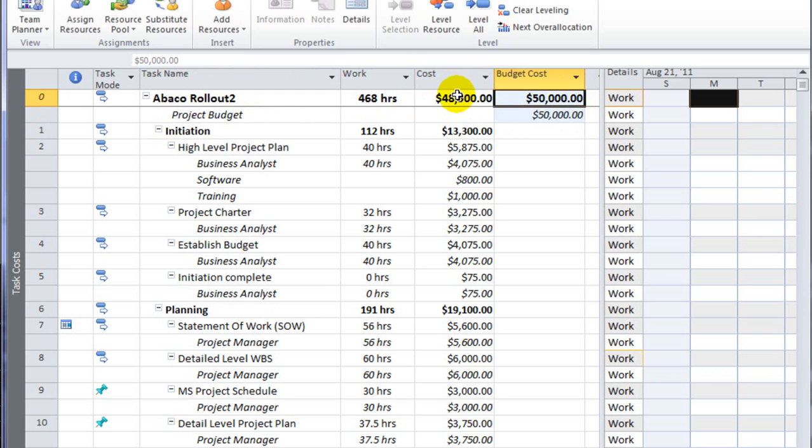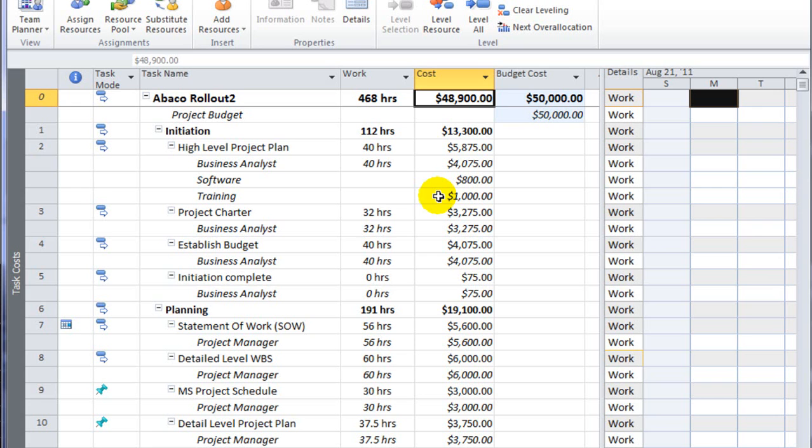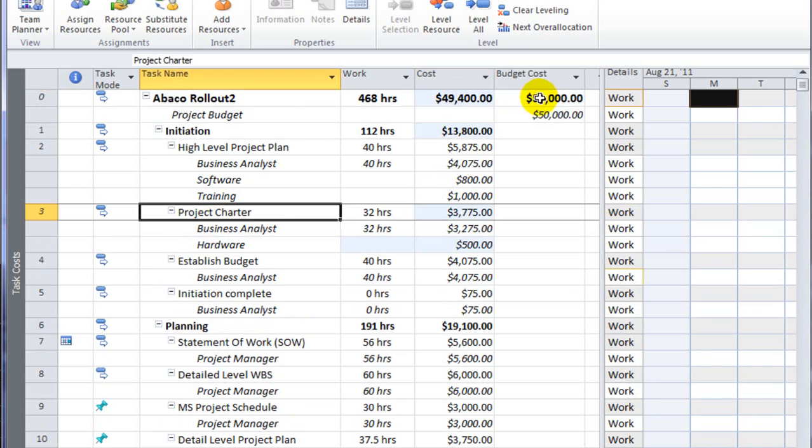My current schedule cost, which is the sum of all my work and detailed cost assignments, adds up to $48,900. So you see how the project budget resource allows me to have a target that I can compare as my costs are accumulating within my project.